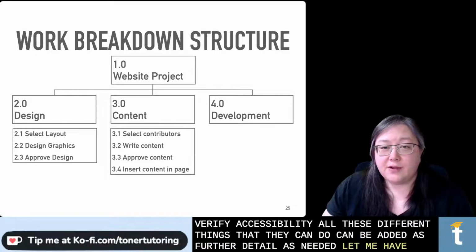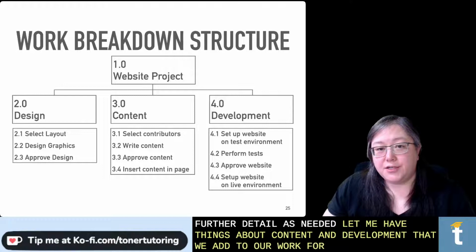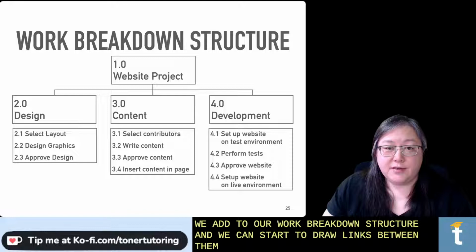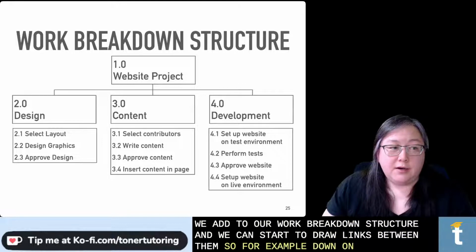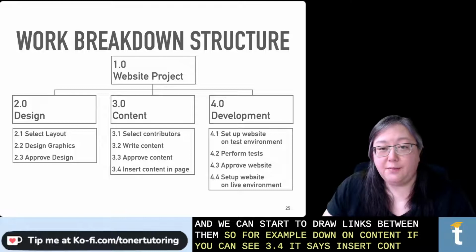And then we have things about content and development that we add to our work breakdown structure, and we can start to draw links between them. So for example, down on content, if you can see 3.4, it says insert content in page.